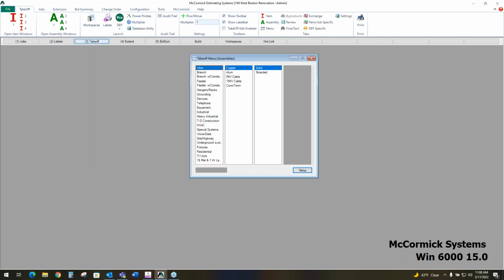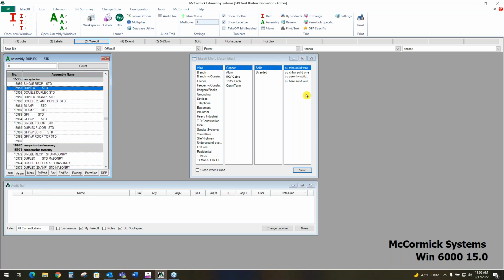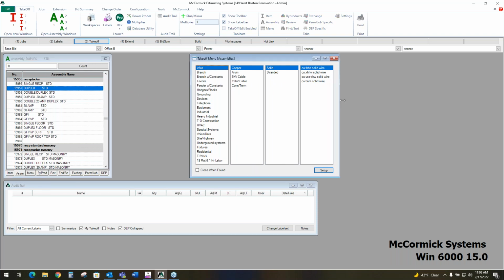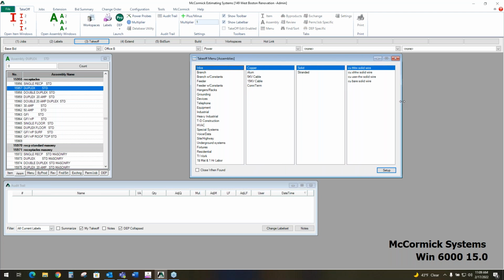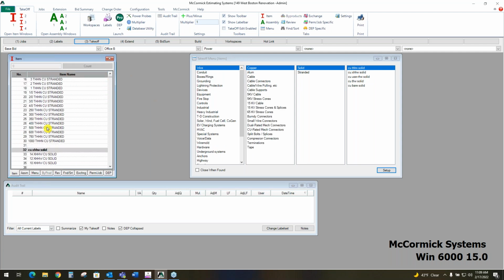Step number 3, takeoff. That's where I'll spend most of my time here with you guys. Takeoff is where we're getting all of the material accounted for. Now I've got you in our full electrical database. Right now, again, we do have a separate database for handling plumbing and mechanical. But again, the database comes preloaded. We've got roughly 70,000 items pre-built in here, ready to go. All of these items have labor units built into them. There's pricing information built into them.